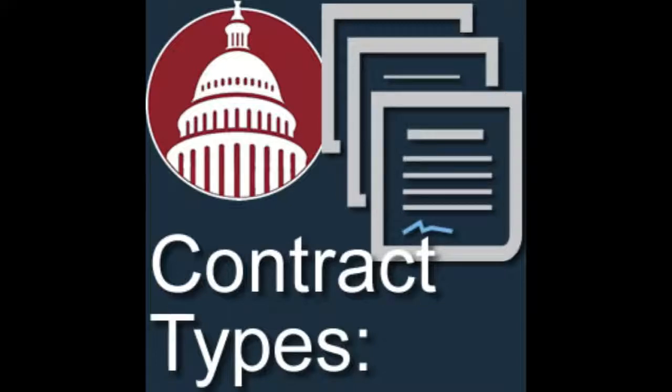Yeah, so let's talk about cost reimbursable. Pure cost reimbursable contracts are unique to the government world. I've been trying to think of an example. There probably is an example of pure cost reimbursable outside of the government world. I don't have one. Send me an email if you have one. That'll be a great add to this discussion. So your proposal in a cost reimbursable world is your best estimate of the cost that it will take you to do the job that the government needs you to do or deliver whatever they need you to deliver.